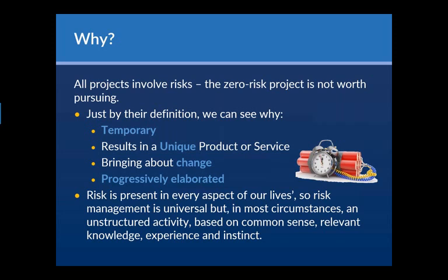So your schedule you'll have a skeleton of it, and as the project progresses, it firms up estimates over time. Estimates are actually a really good example. Estimates have a viability in a period of time. So if you're planning something, for example, at the charter level, your estimates should be completed by or should not exceed a certain level.